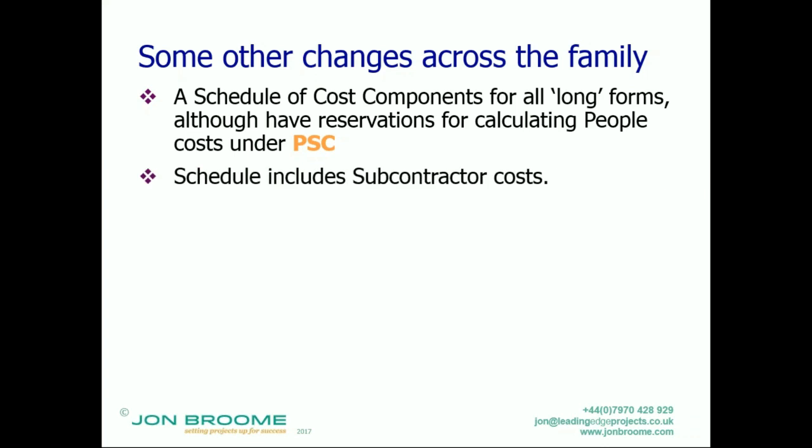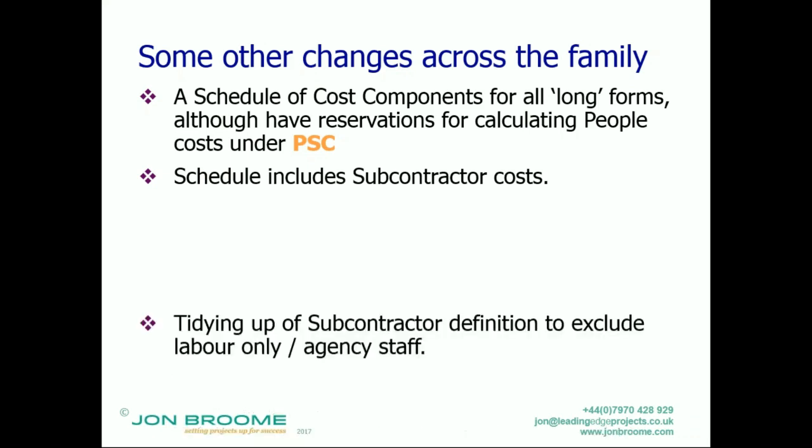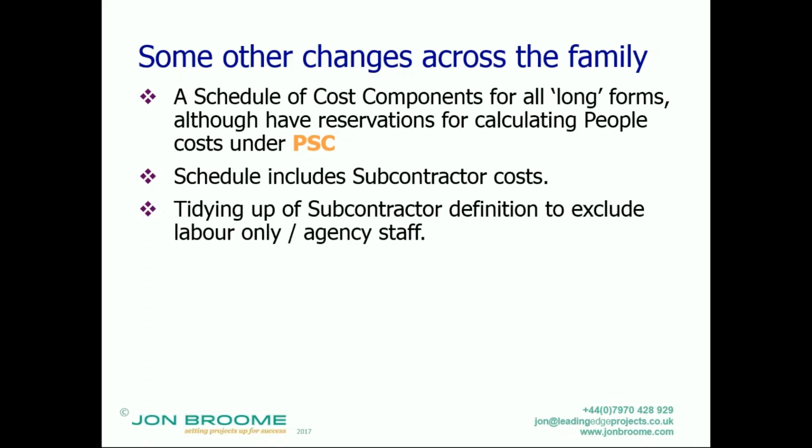The schedule includes subcontractor costs, and they're added in there. That has some ramifications, which I'll consider in more detail next time, but that's good. There's tidying up of the subcontractor definition to exclude labour only and agency staff, along with other changes. I have been involved in disputes over millions of pounds involving that definition. So that's a good one.